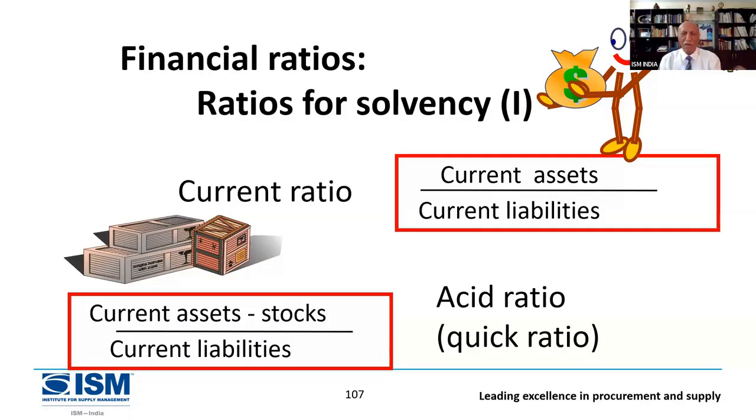But anyway, being in procurement, I will go with the current ratio. If it's more than one, great. And if this one also is more than one, excellent. I would say much better. More the merrier. And you can do this very easily without finance knowledge. Just look at the annual report, and obviously in the very first column, total assets divided by total liabilities.